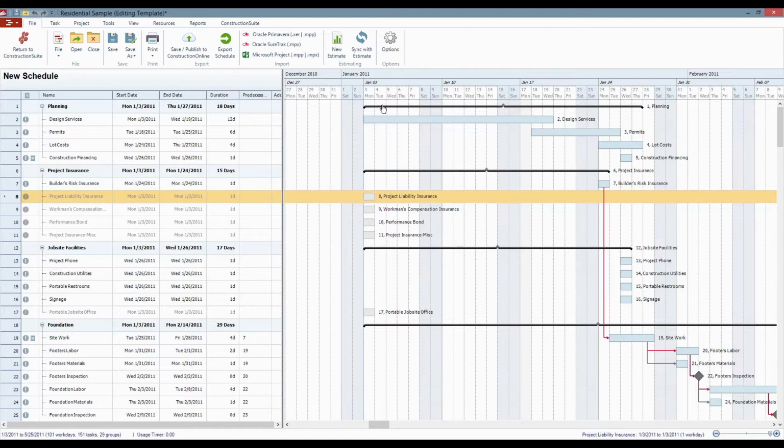First, of course, over on the Gantt chart, you can see where I've got this group, this brace fixed out there, and this will give me an idea if there's one person that I have in charge of planning, then I'm going to probably need their attention throughout this entire period. So if we did any updates for the tasks, that group is going to be adjusted accordingly. And you'll always see that over here on the left. The start date and end date for groups is always being pulled by the tasks within it. So you can do that there as well.